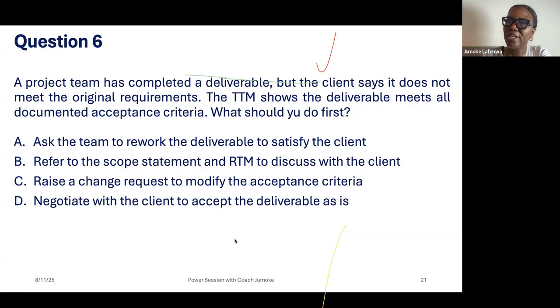When you read a question and you see product backlog, features, epic, listed, prioritized product backlog, then you are talking of adaptive, because the aggregate of all the items in the product backlog will give you the scope of what the project is to achieve. But they have the luxury of changing, modifying, adding, taking out before every iteration.